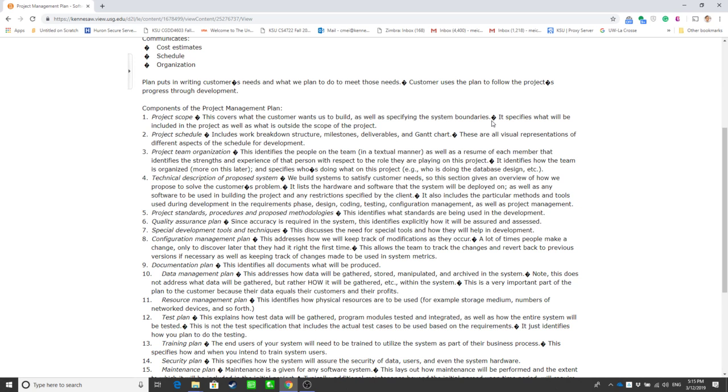You describe the functionalities and the boundaries from a very high, overview level. It can be just a paragraph. That's called scope, because it's not a specification of all the functionalities or all the requirements, and it's not a specification of the use case, which we will do later today. It's just, from a high-level point of view, what the project is. How long should it be? Not one page, just one paragraph, two to three sentences, or three to four sentences.